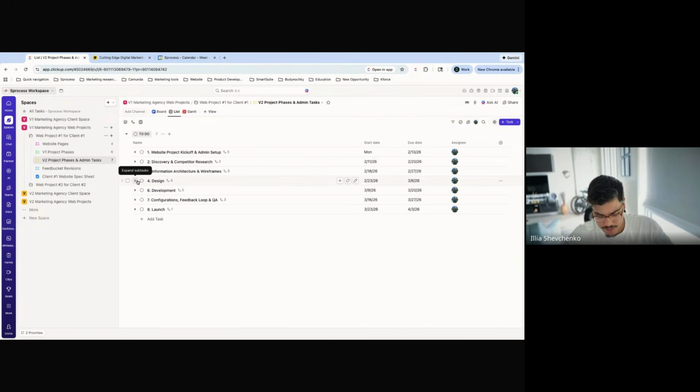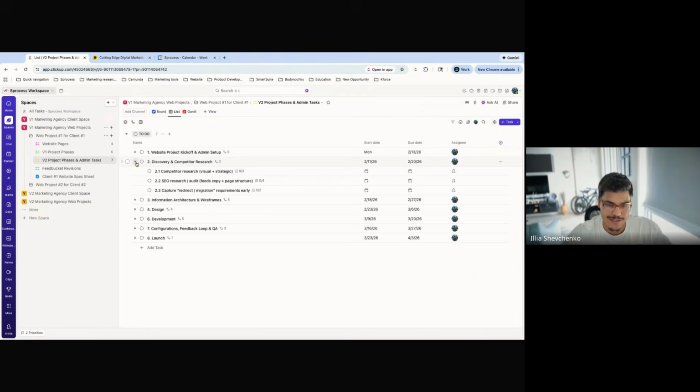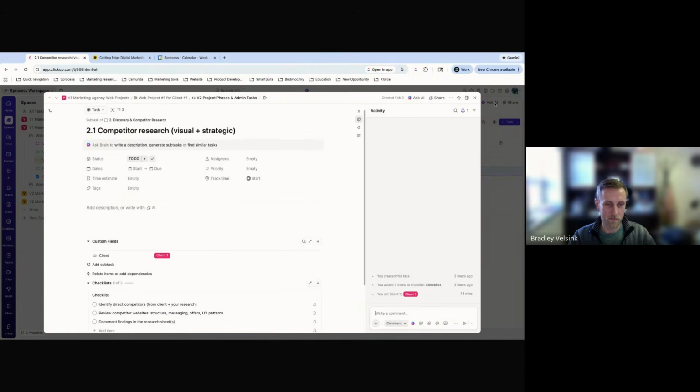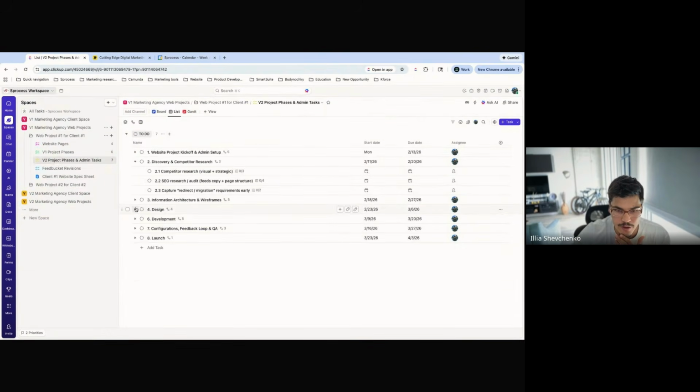We're going to have a very similar approach to what we had before, where we group them as subtasks for different stages. The only difference, as I mentioned before, is that instead of breaking all the little things we need to do into separate tasks, we'll try to group them into bigger chunks of work that will become subtasks for the stage task. And then those small items that need to be completed will become just a checklist inside the big chunk of work. So again, let me just see if I have design.